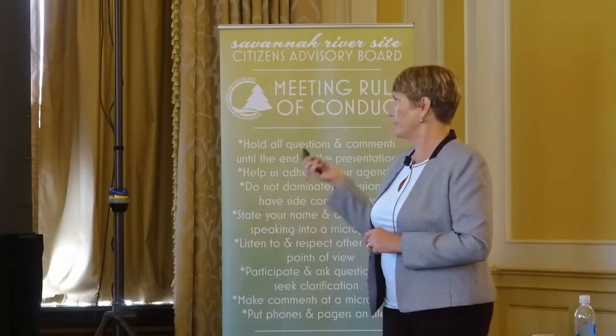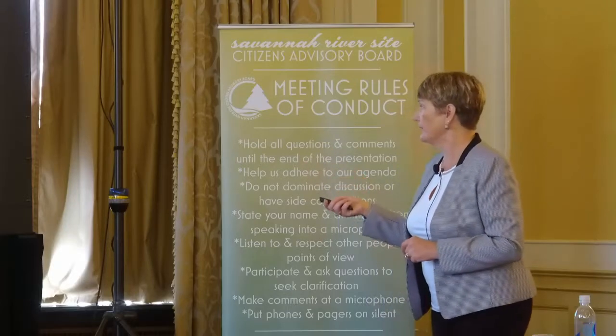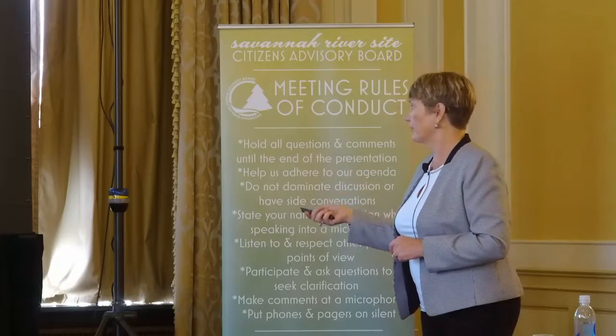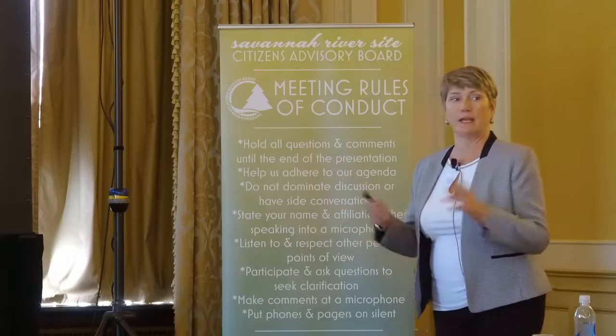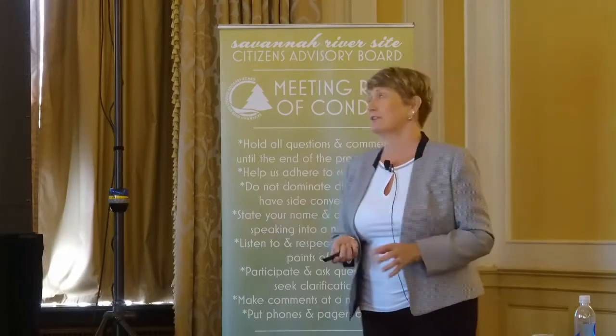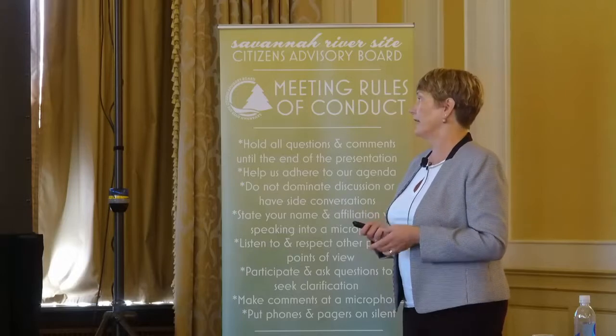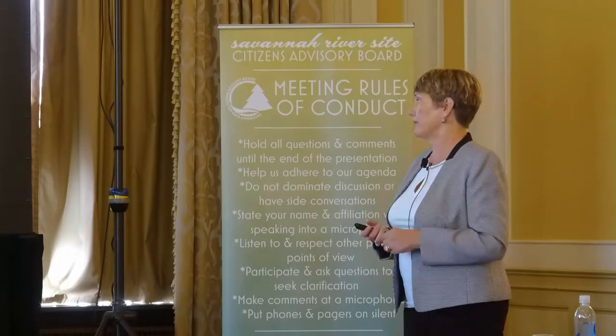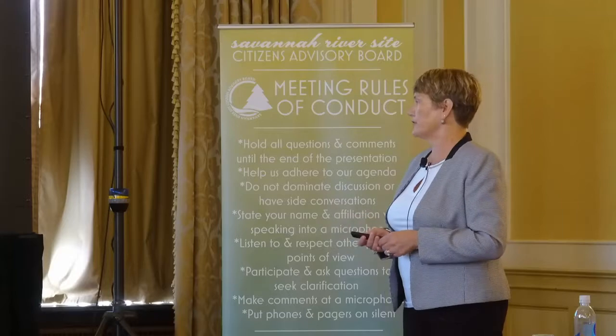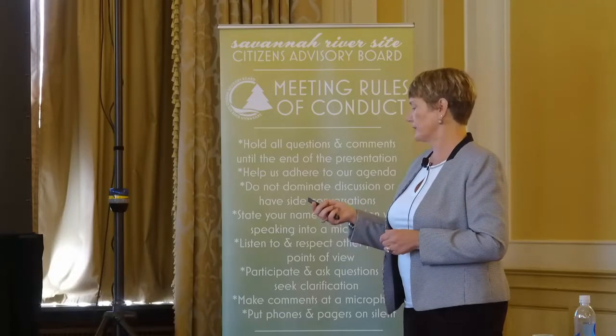Once we become hot, we do have a few other performance tests that we need to do that obviously we can't do without radioactive material. We've got some shielding calculations or measurements we have to do. We have to measure some stack effluents and of course ensure that we're meeting all of our waste acceptance criteria.